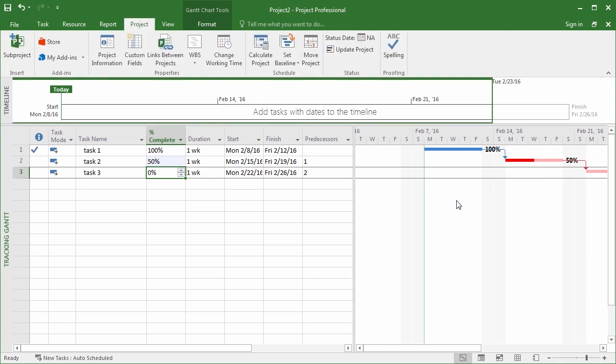Now there's a really nice trick that you'll probably use in real life. It was originally intended for when your boss comes by and you're in the middle of a project and says, "Ooh, let's put this project on the back burner right now and come back to it later." So basically, we'll stop the project and then reschedule it at some other date. By the way, best practice is, if you don't have a restart date or can't get one, the project should be treated like it's over.